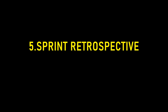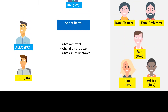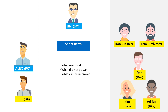Let's move on to the last event: Sprint Retrospective. This is the last sprint event and happens after the sprint demo. The purpose is to identify areas of continuous improvement. Attendees are the Scrum Team, Product Owner, and the Scrum Master. Three questions are asked and team members provide their feedback: What went well? What did not go well? And what can be improved? The sprint demo feedback, impediments, and estimates can be discussed and the team can work on corrective actions in the upcoming sprints.